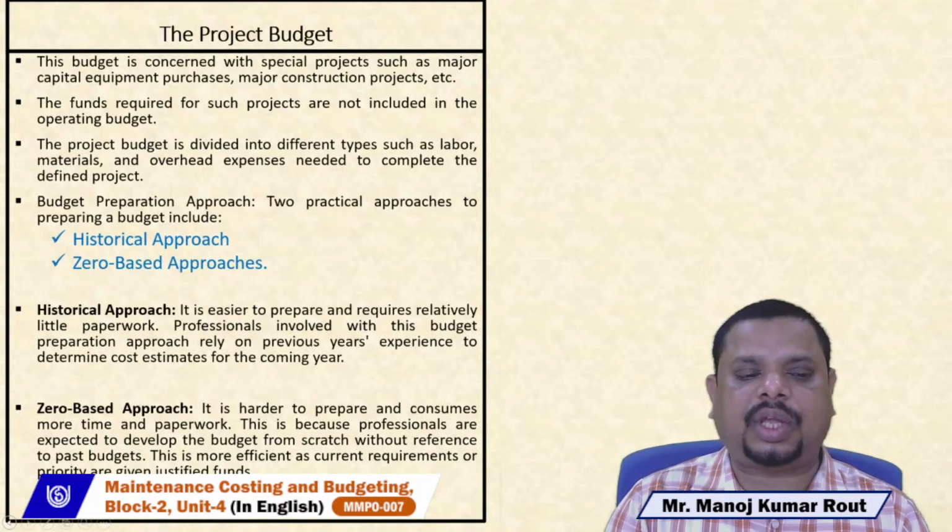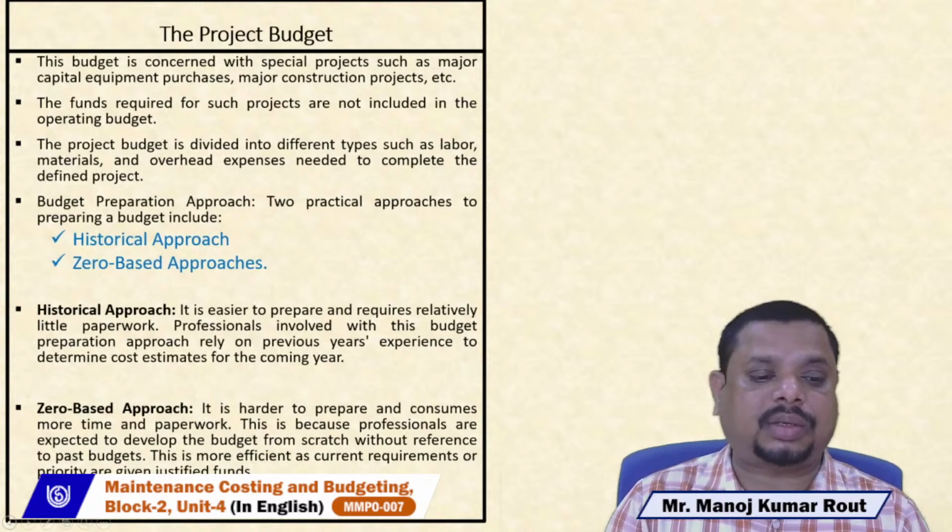The next one we have is the zero-based approach. Under the zero-based approach, it is much harder to prepare and consumes more time for paperwork. This is because professionals are expected to develop the budget from scratch without any reference from the past. But it is more efficient, as current requirements or priorities are given justified funds.